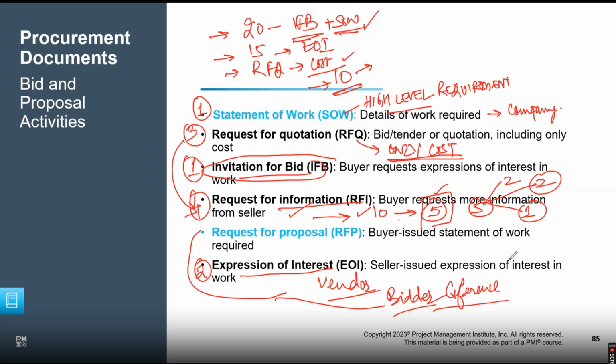We will be asking our questions, and they will be asking theirs. Everyone gets the knowledge about what needs to be done. Based on that understanding, they will be required to submit an RFP, a request for proposal. That is a detailed document covering every single detail about how you will handle the work, including the cost, what you will cover and what you will not cover, the scope and out of scope, absolutely in detail, a complete end-to-end proposal. From there, we will shortlist some vendors.